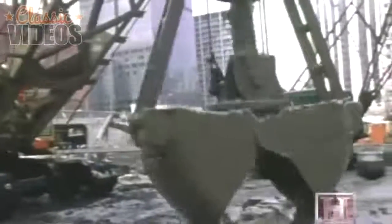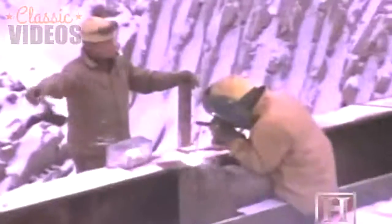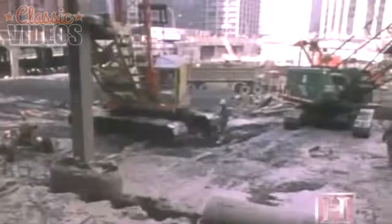Ground was broken in August of 1970. We started almost immediately. I didn't have finished working drawings. I had finished working drawings close to the day that we would start that particular phase of the project, so that the foundation drawings were finished before anything else, and that's when we started the foundations. By midwinter, work on the foundation site was well underway.